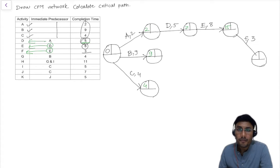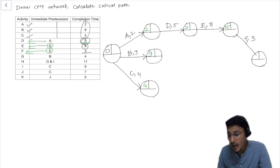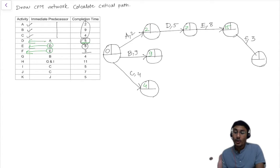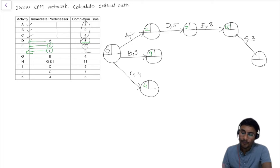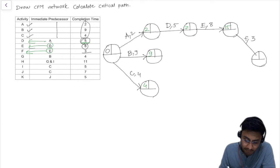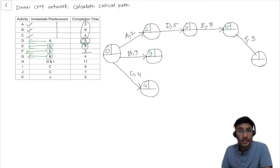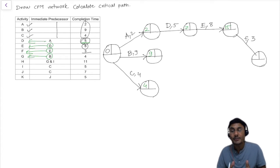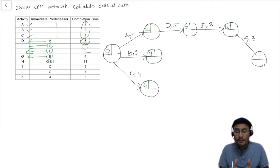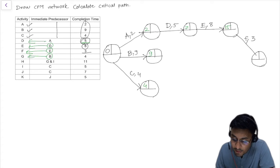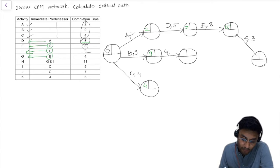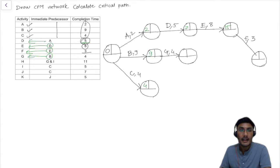For F: 15 plus 3, but we need to wait and look at the maximum value that will be coming at this point. Going back to our table, B activity finishes and then G activity is going to start. Once B activity completes, G activity starts — G activity has a duration of 4. So 9 plus 4 is 13, so we write 13 there.